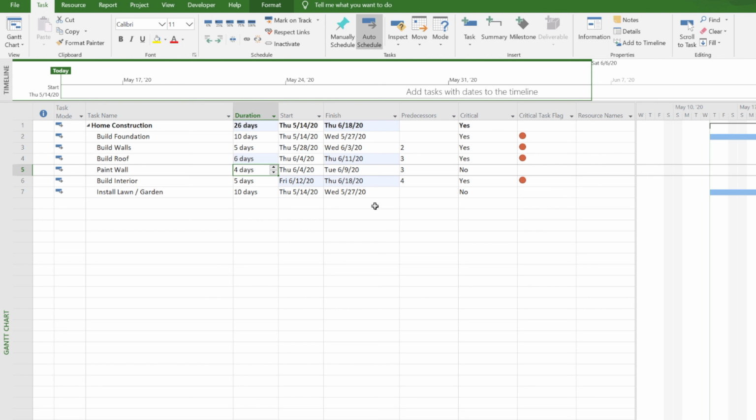So the sponsor would ask you, would that impact the project? Right now it's not critical, so you may not know, you have to put 6 days and see if it becomes critical. So you can say, okay, I put 6 days, that's fine, it's not going to impact. But let's say the contractor comes back and says, hey, I need 10 days, then when you put that, it's still not critical because it's going to complete before the project completion, but you have to do that guesswork, right?